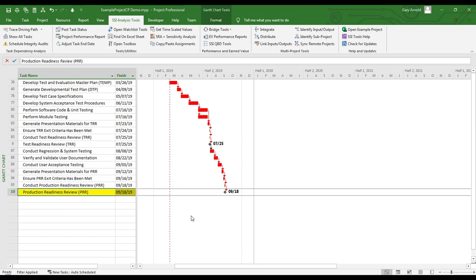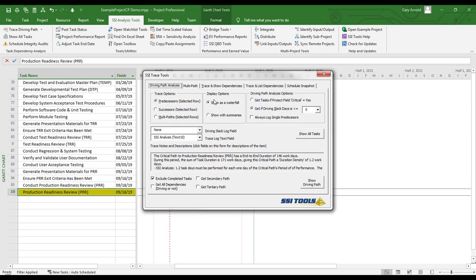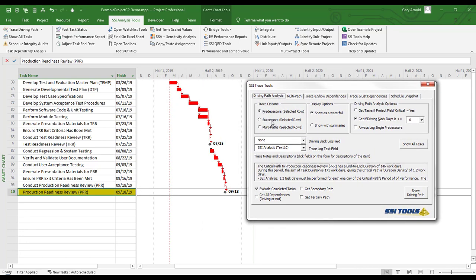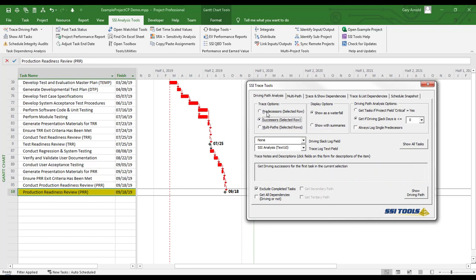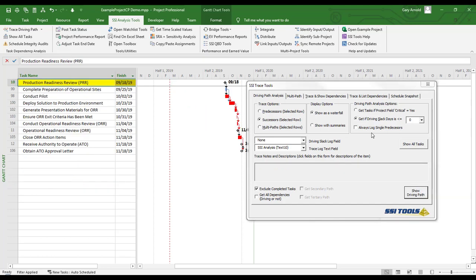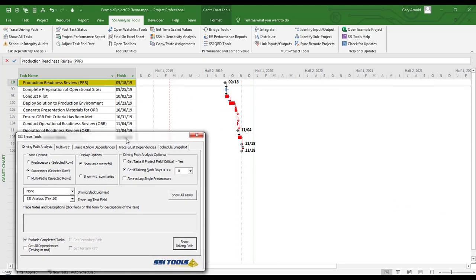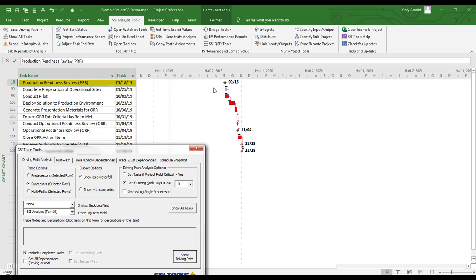Now let me show you some additional display and trace options. I'm going to open the Advanced Trace Tools form. Instead of tracing predecessors, I'm going to look forward and trace successors. This is going to show me all of the tasks that will be impacted if Production Readiness Review is delayed — a forward look rather than a backward look. And these are all the successors that would be impacted if Production Readiness Review were delayed by even a single day.